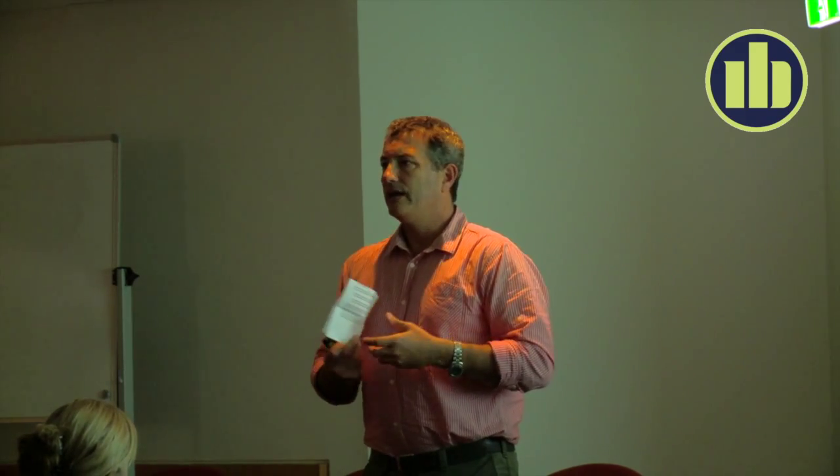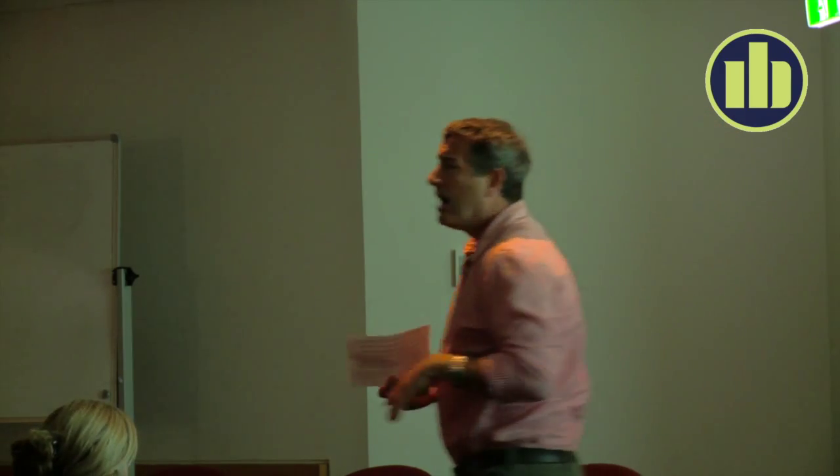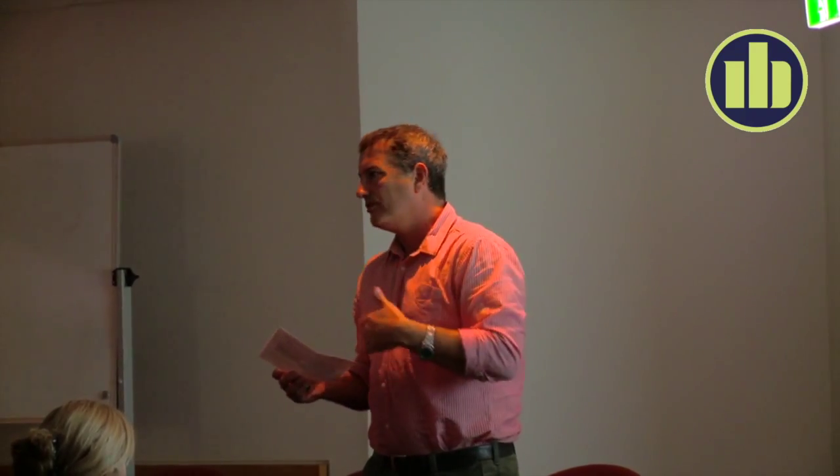In terms of what we had to deliver, and there were many things, but a key deliverable was being able to issue visual quantities to subcontractors. These were given to the subbies so that they could put their tender together. The concept was that if a subbie could get a really clear understanding of what the scope was, and he could see how these big acres of work were going to be done on this project, it's 185,000 square metres, then they would get a far more efficient price. So that was one thing. So the way we did that, from Costex, we issued Costex reader files, and the subbies were able to work with that information. The other thing they wanted was they wanted us to be able to revision it.